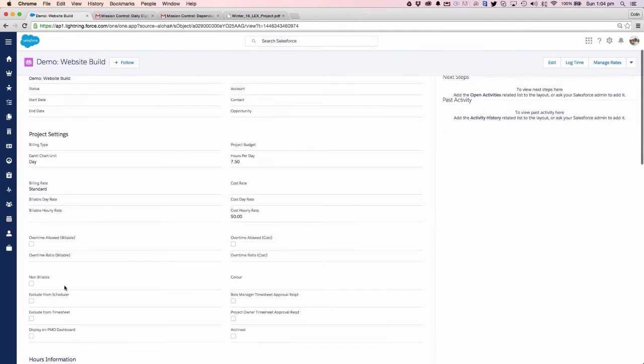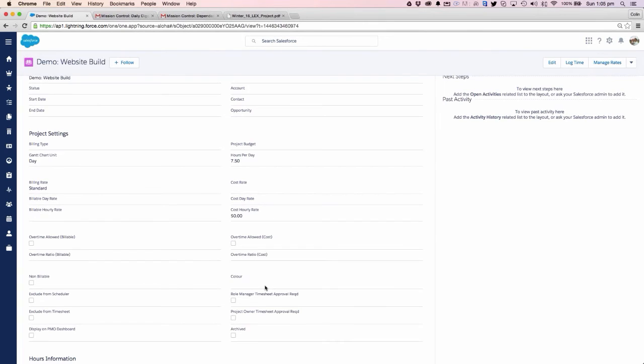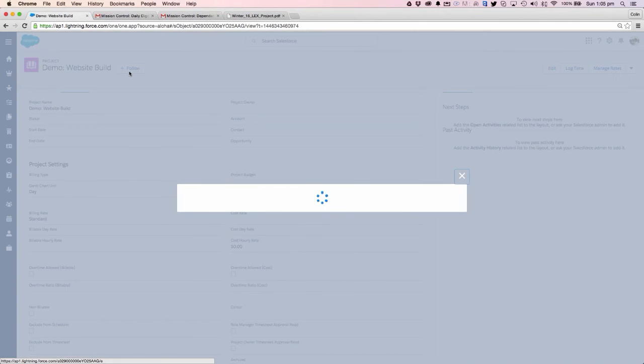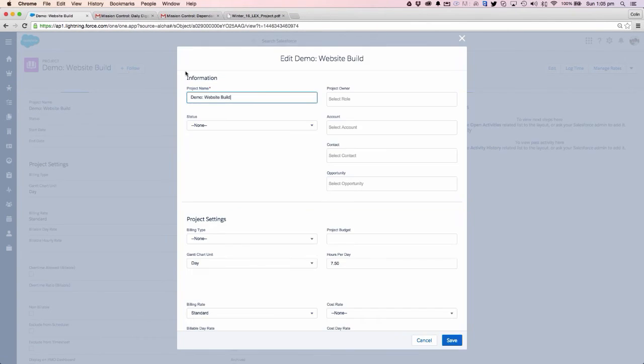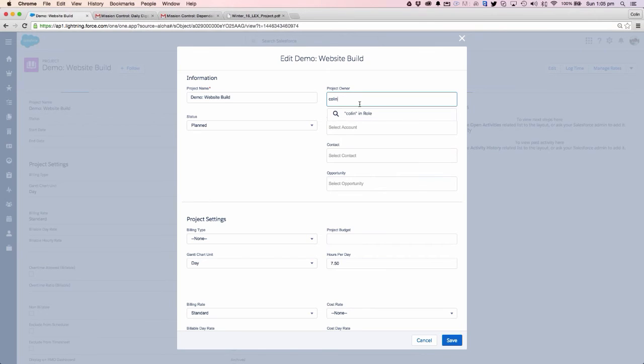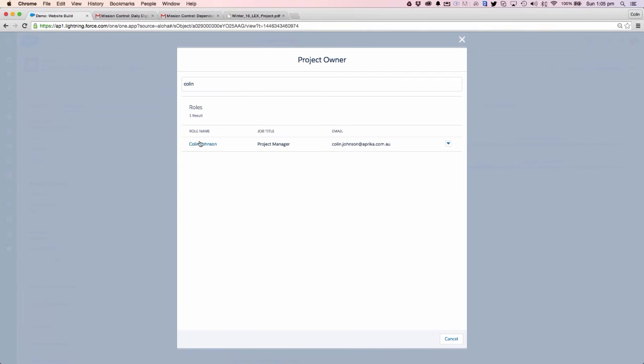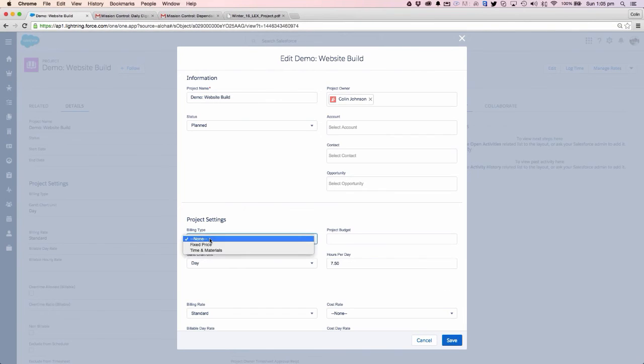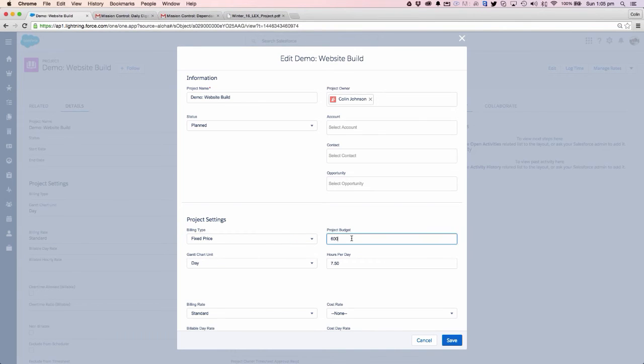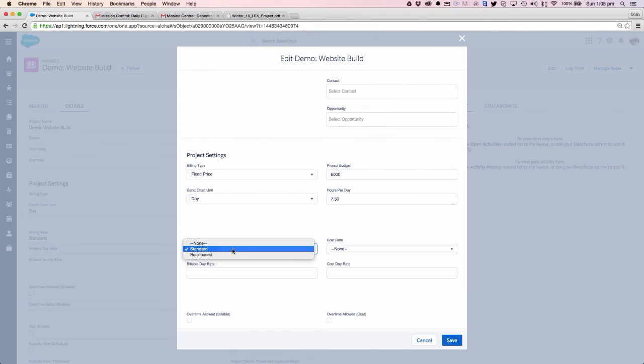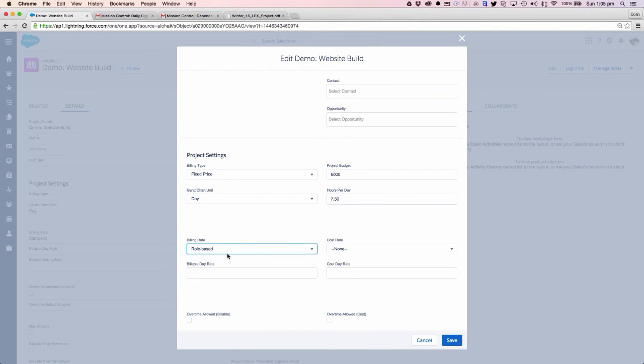We're able to categorize overtime. Is this a non-billable project? Do we need timesheet approvals? All of this information can be edited simply by clicking on the edit button here. This will pull up the edit page and we can put in as much or as little information as we need to. I can indicate it's a fixed price project, what the budget is for the project, and calculate the billing rates. Whether it's a standard rate, meaning regardless of who's doing the work it will all be applied at the same day rate, or we can use a role-based one so if we've got people with different levels of pay grade working on the project, we'll get a more accurate cost.